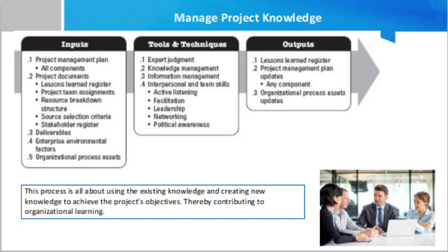In agile, at the end of each iteration or sprint, there is a review called a retrospective, which among other things documents the issues encountered that have been resolved and the lessons learned from them. This does two things.